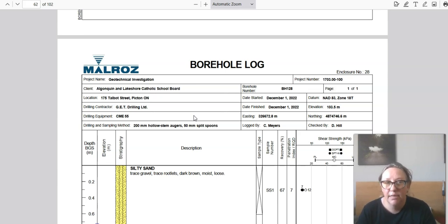Exclude it in writing, because if you didn't exclude it in writing, there's always a chance that your customer could come back to you and say, oh, well, we didn't know that wasn't included. So if it's not in writing, it didn't happen. Make sure you include those kinds of clauses in every bid and every quote in writing so that you can cover your butt and not lose money.